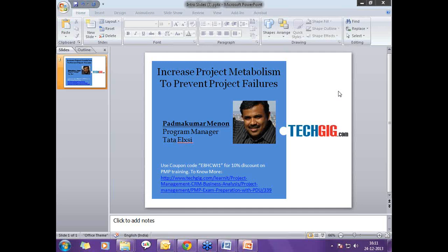What happens is project managers think that if I conduct a requirement workshop and risk management workshop in the beginning of the project, everything is done. No. A risk management workshop is a live thing. It should be repeated in the project. So with this risk management and requirement workshop, if there are additional things which have come out, at least you unearth the hidden effort. If you can unearth the hidden problem, you can actually solve it. A risk which is visualized is half solved. If a risk cannot be visualized, it cannot be solved.